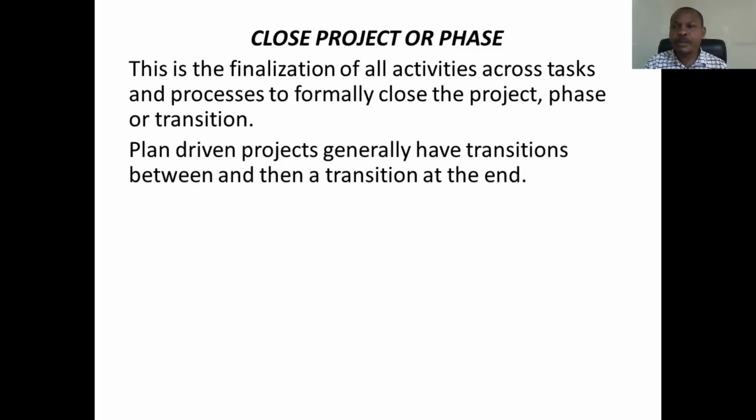So at every point of this transition, you either start and then you close. You start the earthwork, you close the earthwork. You begin the foundation, you end the foundation. You start with the block works and then you finish the block work, or you start with the road work, or you start with the stabilization, you're done with the stabilization, or you're starting with the base course and you're done with the base course, or you're starting with the binder course, you're done with the binder course. That's for road projects. So you have to tell us every piece of all these projects.